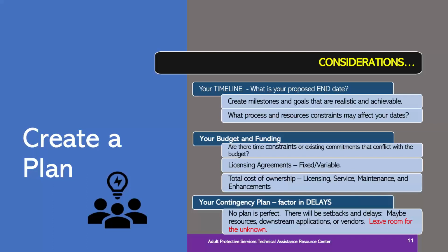If you're getting software that requires licensing, you should examine the licensing. Sometimes the first year for licensing, the fees will be minimal, but the second year they will double. So in that same instance, you would look at the total cost of licensing. I would inquire about licensing over a 3 to 7 year period. So licensing is one piece of it.